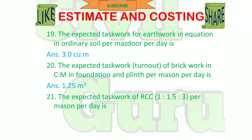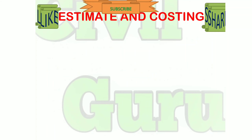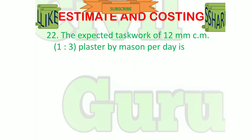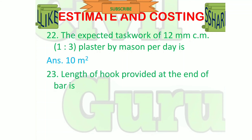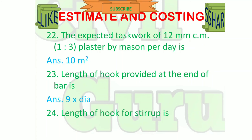The expected task work of RCC 1:1.5:3 per mazdoor per day is 3 square meters. The expected task work of 12 mm cement mortar 1:3 plastering per mazdoor per day is 10 square meters. Length of hook provided at the end of a bar is 9 times the diameter. Length of hook for stirrup is 12 times the diameter.